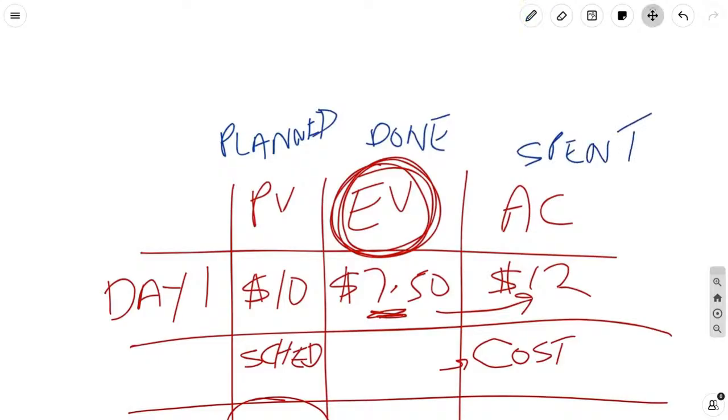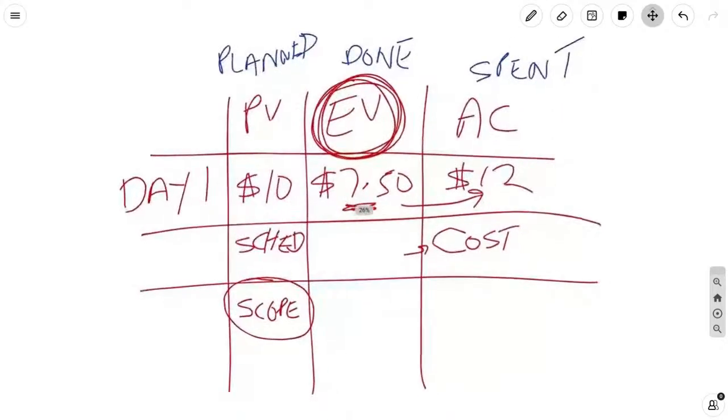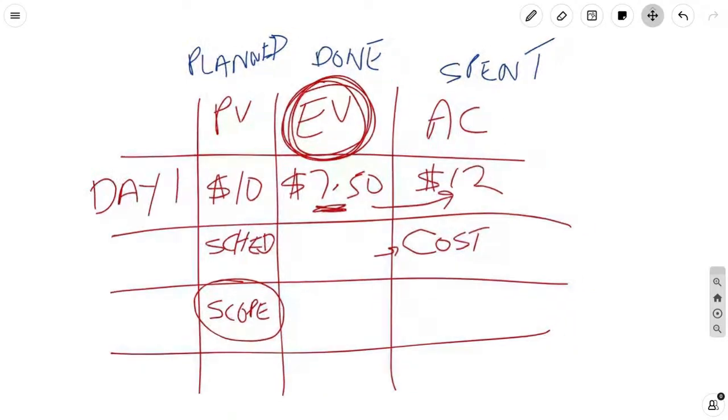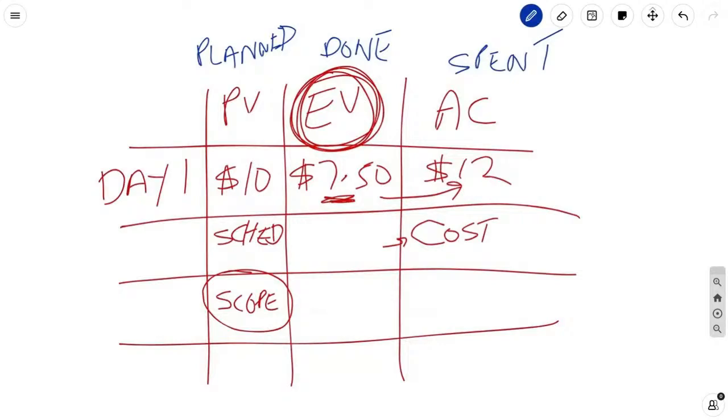It's a common sense thing. And once you get this, whenever you look at these metrics on your exam, you will always understand what the state of the project is. Because if earned value is lower than any of these two, it's unfavorable. If it's equal, then you're right on target. You get what I'm saying?